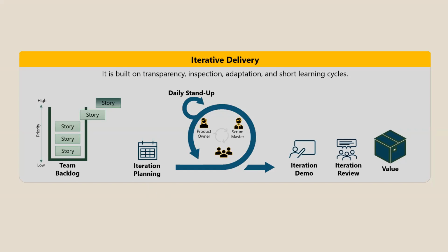One more thing, what you do as part of the daily stand-up is you do a meet after planning. If there are certain topics that cannot be completed within 15 minutes, but do not require the participation of the whole team, you plan for a meet after, whether it's with a product owner, whether it's with a Scrum Master, and the specific team members who will meet after the daily stand-up and discuss things that need to be discussed.